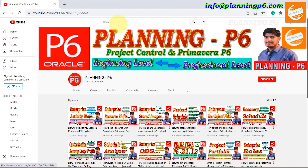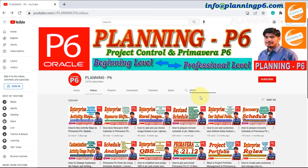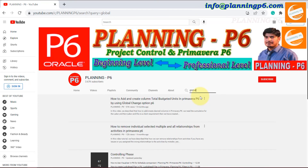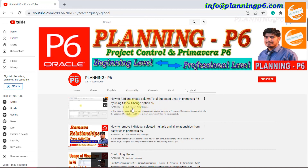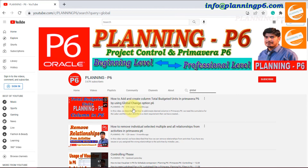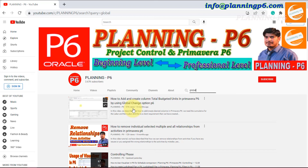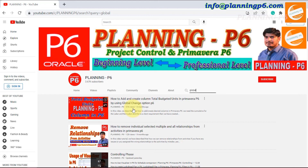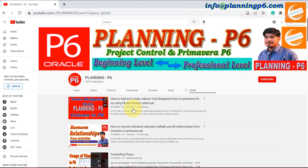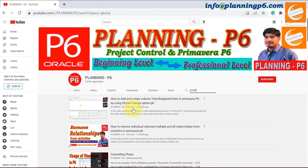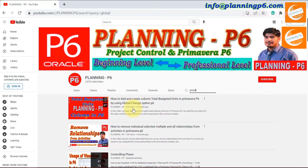You can find that tutorial on our YouTube channel — search 'Global Change' and you will see the video on how to add total budgeted units as a column in Primavera P6, where a filter is also applied. Remember: when you commit the Global Change, you cannot undo it. It is better to copy the project first before applying, so you always have a backup to refer back to.